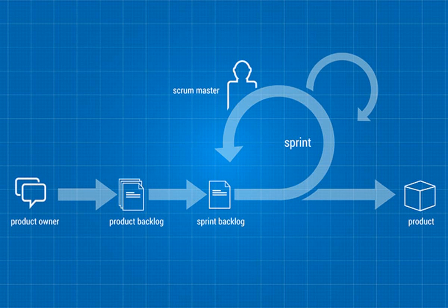Once we vet more detailed requirements or do a proof of concept to address a technical risk, we can sit back down with the customer after those spikes are completed. That gives us another checkpoint after sprint zero to recalibrate budget, schedule, and scope if needed — whether that means additional user stories or any other impact on the product backlog.